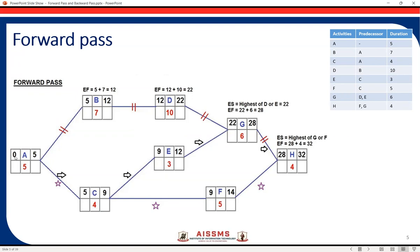To calculate the early finish, we add early start to the duration: zero plus five equals five. So the early finish is five for activity A. Now activity B and activity C are dependent on activity A. For activity B and activity C, the early finish of the predecessor acts as the early start of the next activity. So for B, the early start is five, and for C, the early start is also five.